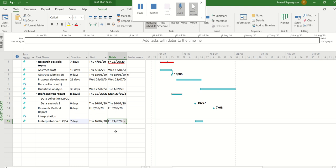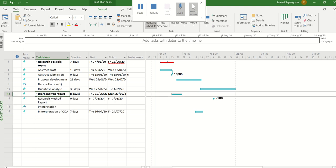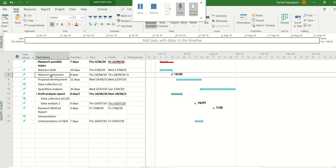Okay, so now is a good time to add some milestones. Milestones are great ways to make sure your project is running on time. Okay, one way to do that is the duration that you use, the duration day, and make it zero. So for example, if you have the submission day, maybe here you can find one of those. Here, submission. Yeah, this one, abstract. The submission date is, for example, if you say my submission date is two days.